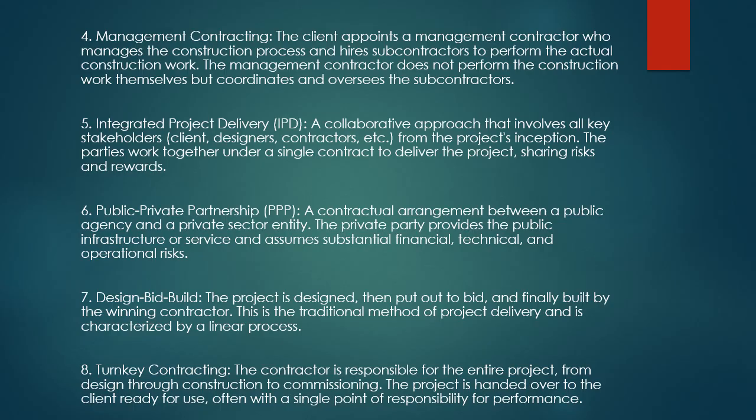Number 5, integrated project delivery (IPD), a collaborative approach that involves all key stakeholders: client, designer, contractor, etc. From the project's inception, the parties work together under a single contract to deliver the project, sharing risks and rewards.